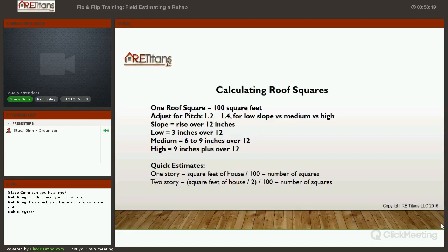The other way that you can get roofs calculated for you exactly, and it does cost a little money, is a program or a company called Eagle View. And honestly, you can do that as a retail customer, and Eagle View is what's used by a lot of your roofing companies to get that, and that's what they use for their bids. They have subscriptions and stuff like that. But Eagle View will give you a bid on your roof and how many squares, and that's a paid service.